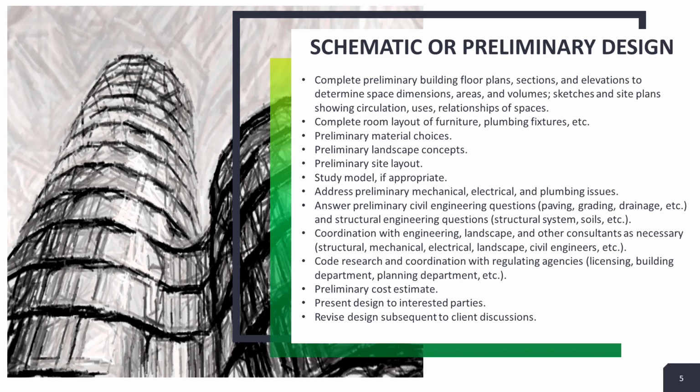So if we get all the way through construction documents and then the owner decides to make an extreme change, we need to be paid for that. So by having them sign off at each phase, then if we have to go back and redesign, we can charge additional fees. So again, you can read through the work in this phase that is typically included.